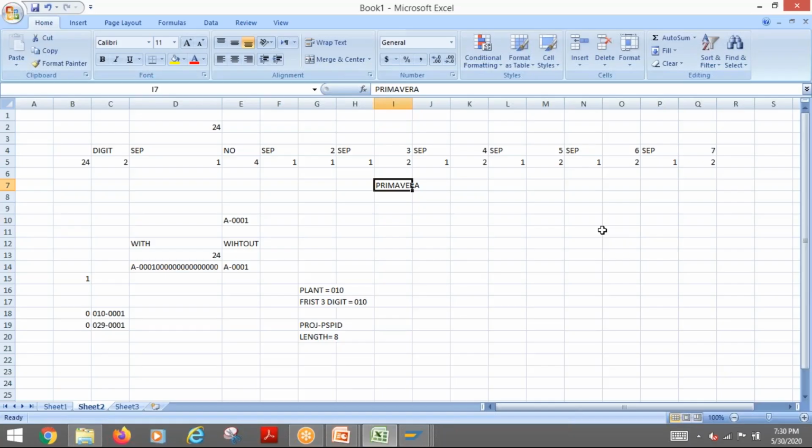What we did was create a project WBS and one network, so that the number range available on the SAP side, the same number I transferred there as a task itself. There is one more column, called object, which defines what is the network and what is the WBS.